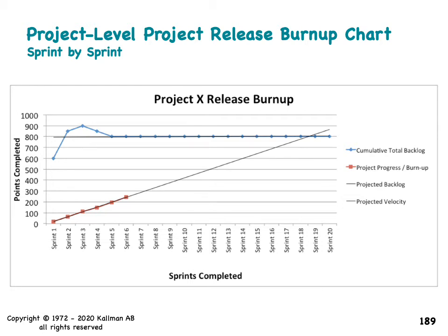And anyways, on a sprint by sprint basis, you can see if this line's moving up or down. So if the couple sprints before the line had been slightly lower, which it looks like it would have been, that means that if the line's going up, then you can see the team is actually accelerating a little bit, and it appears that they've created a sustainable velocity.